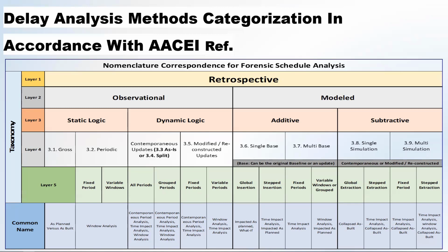If we are doing excavation and there is soil replacement, and once we start excavating, we find out that we have a groundwater table that is not mentioned in the geotechnical report. So an event came, which fragments, it's not a correct English word, the work into finding groundwater, dewatering, and then clearing an inspection, and then starting the soil replacement.